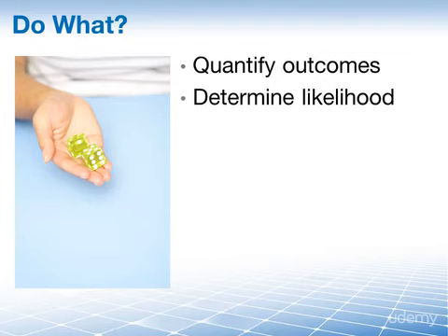For instance, there is an 80% chance that we will be back on schedule if the order comes in by Friday. With a quantified value for each risk, you can sort them accordingly, and then, if you wish to apply the 80-20 rule, you can focus on the top 20% of your risks only.